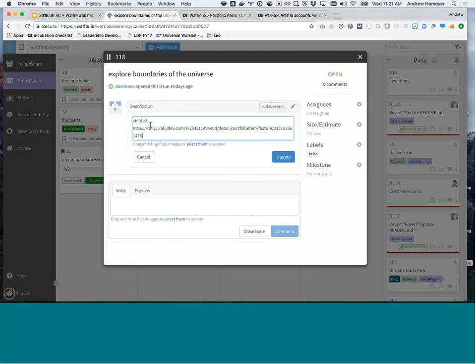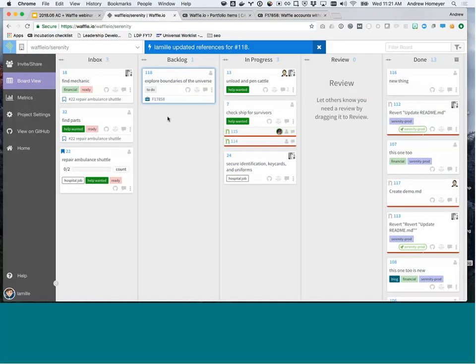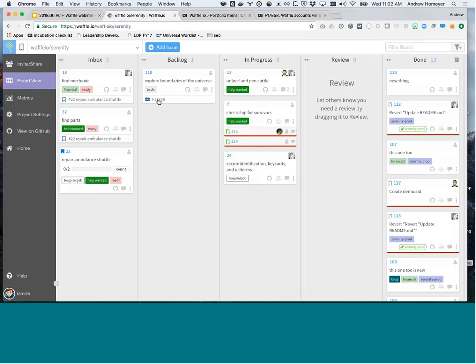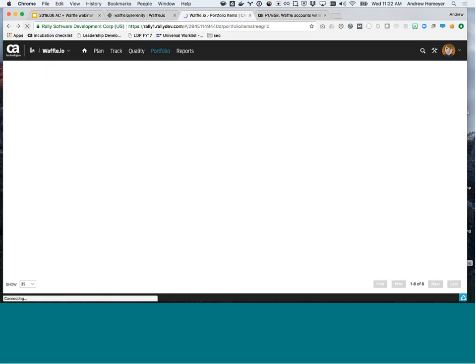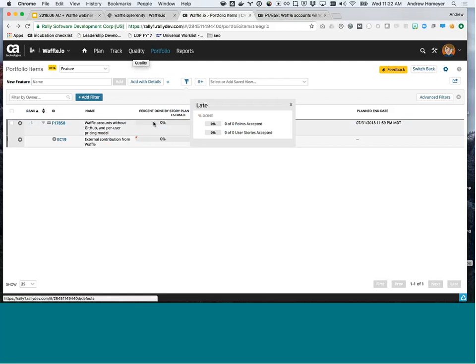Waffle uses this language like child of and blocks and depends on to do a bunch of really cool features like dependencies and epics. So this is just a waffle pattern. But from anywhere inside waffle or even within GitHub directly, you can say child of, a link to that feature. And cross our fingers. Cool. So in real time, you see that now this card has a reference up to that feature. So if I were to click this, it would open up a new tab so my developers can see the context for the work that they're doing. If they go back to Agile Central, this is where the magic happens.